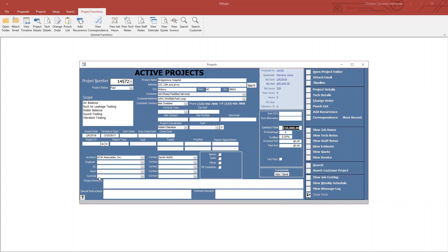Today I'd like to show you how we do change orders within the project management system of the TabOps database. To do a change order, you'll simply click on change order to the right here.